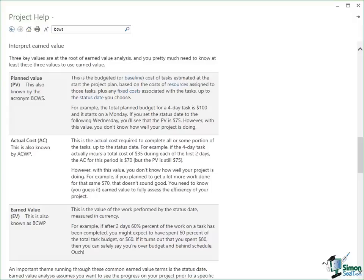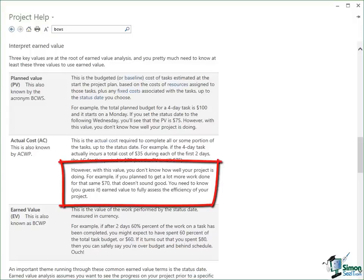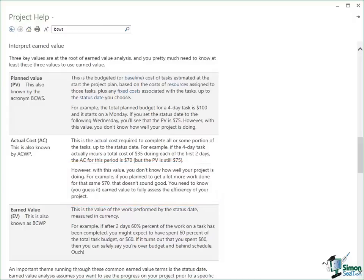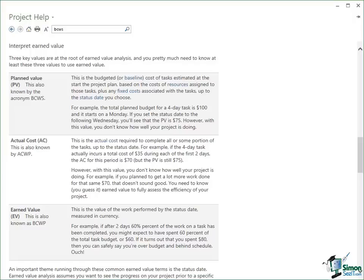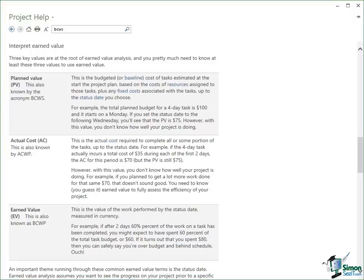However, with this value you don't know how well your project is doing. For example, if you plan to get a lot more work done for that same $70 that doesn't sound good. So I've got to the end of day two. I've spent $70 instead of $50. Maybe I'm just ahead of schedule. Maybe I'm doing really well and I'm going to finish this task early because I've done the work early. Or alternatively, I may still have another two days work to do. I may still need to spend another $70 to do the second half of the task in which case overall I will have overspent considerably. I will have spent $140 instead of $100. So the actual cost also doesn't tell you everything you need to know. It's one more piece of the jigsaw. It basically says at this point in time in relation to this task what is the actual cost of the work performed. It doesn't tell me what the value of the work is. It only tells me what it costs to produce it.